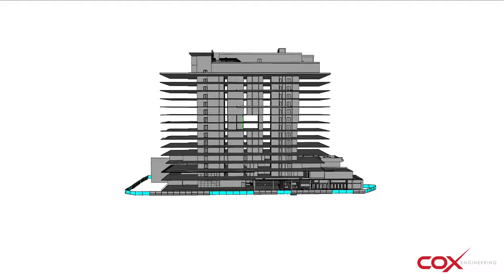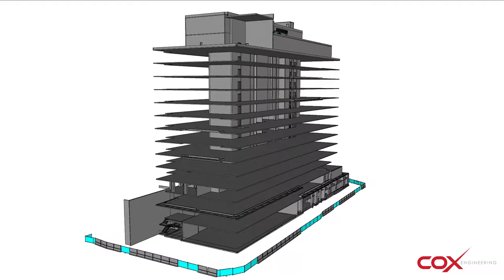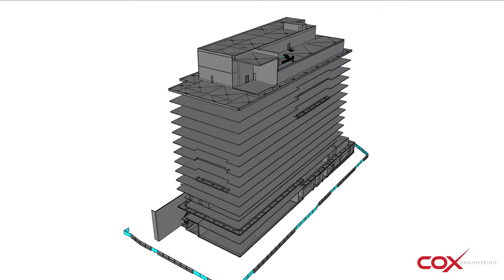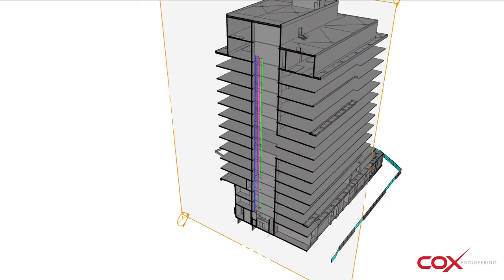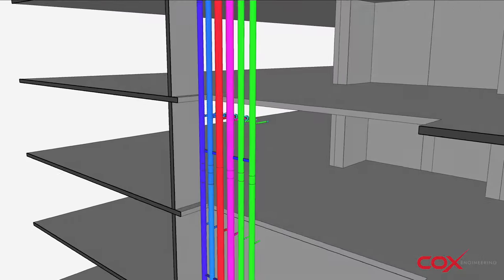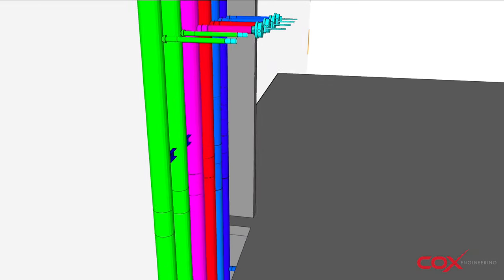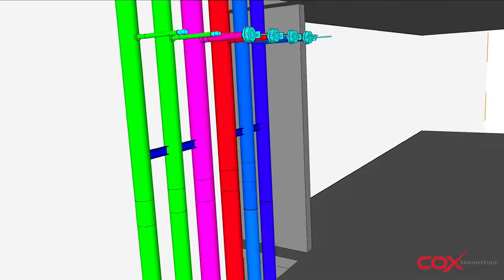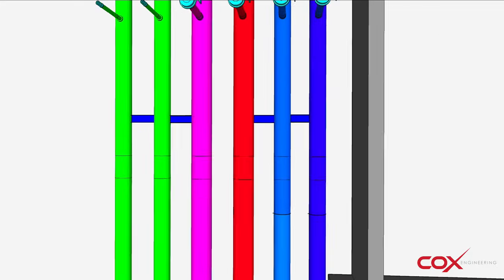We decided this would be a good project to utilize the pre-con department to come up with a plan to pick up our risers. So what we designed during the pre-con operation was to have all of the joints at the 5 foot level, as opposed to just sticking 20 footers in on floors and welding wherever the joint would fall. You'd put a welder in a bad position between floors, near steel, where he couldn't access the joint and give the customer quality weld.